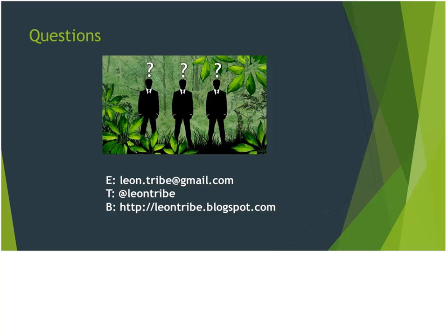For 2010, which is what I was using, we're just using the query tools. The main aspects they want to know are how many active bugs there are, how many resolved bugs, and how many closed bugs. They want to know how many bugs have been resolved or closed in the last two weeks, and things like that. To generate those, you just do a query. And if you want to do other things with it, rather than just have the list of records, you export it to Excel, which is just a button click within TFS. And from there, you can do whatever you like.